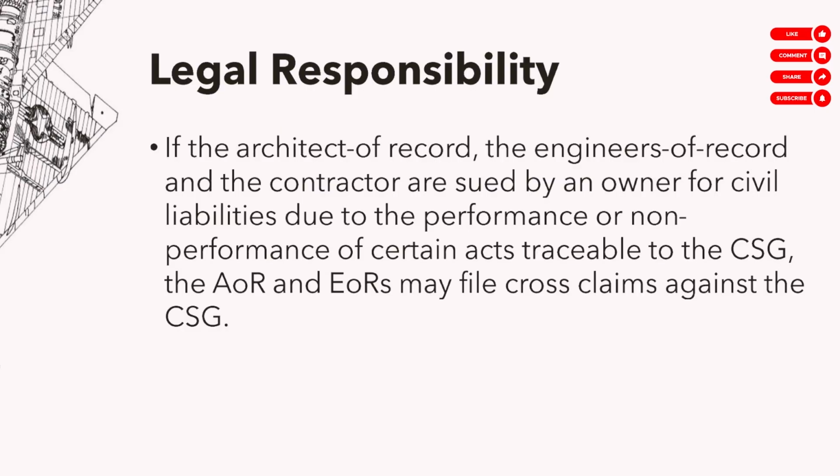Okay, so anong remedy, anong pwedeng gawin ng consultant, structural engineer? Kasi nasampahan siya ng kaso ng owner. Okay? Ang pwede niyang gawin is mag-file siya ng claim, ng sarili niyang kaso against the CSG. Because ang claim naman niya is, na-correct ko, pero hindi lang na-transmit ng CSG sa contractor. Parang I would imagine that that's what this is about.